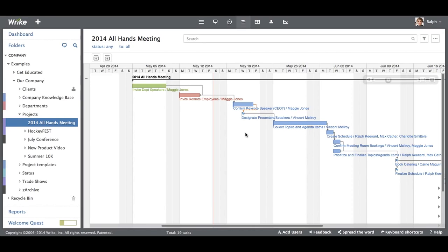You may need prior authorization or approval, even notifying a customer prior to moving those. So whatever the scenario, the milestones are really perfect for this because they're not going to move with the dependencies. Instead, it creates a conflict and requires deliberate action. I have to come in and physically reschedule this milestone. It's never going to move on its own.